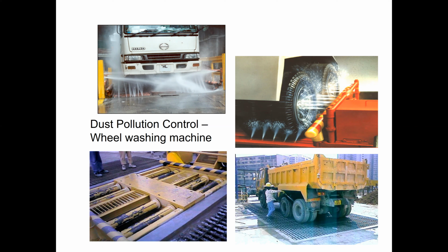Usually, when trucks leave a construction site onto the public road, mud is attached to the tires, and when that mud dries it becomes soil particles, so dust is created in that area. We have to control dust so that there is none on the public road. In our country, I saw people put their material on public roads. In developed countries, every material must be stored within the boundary of the construction site. No one can use, damage or harm public roads. A public road is public property for the people, so it should be protected.